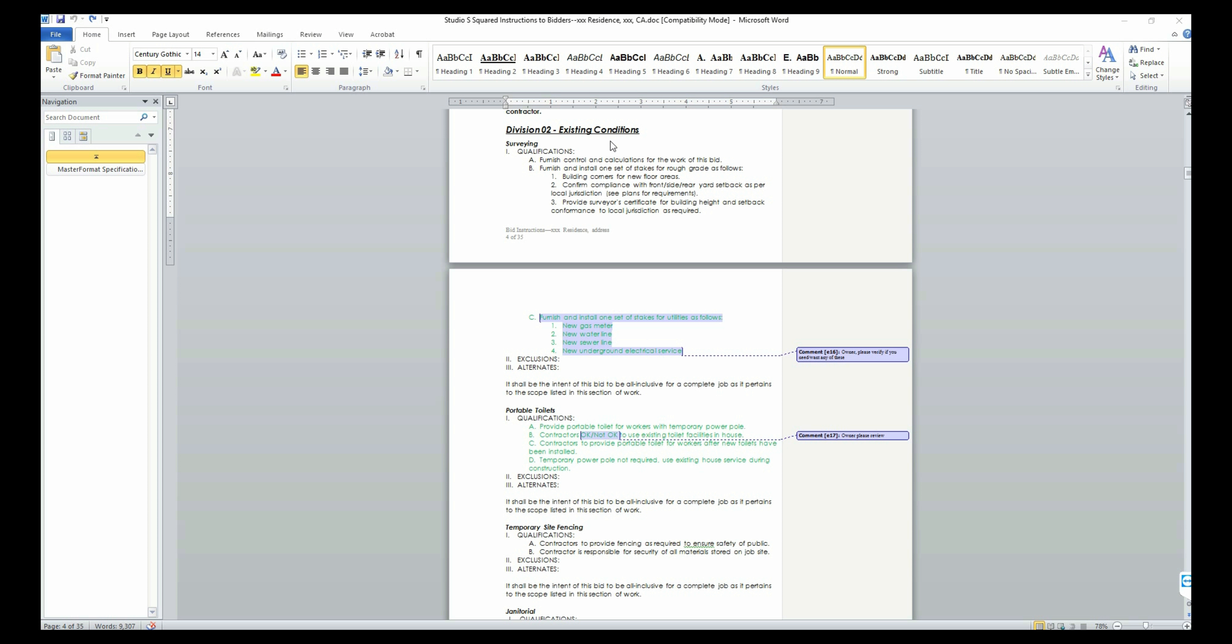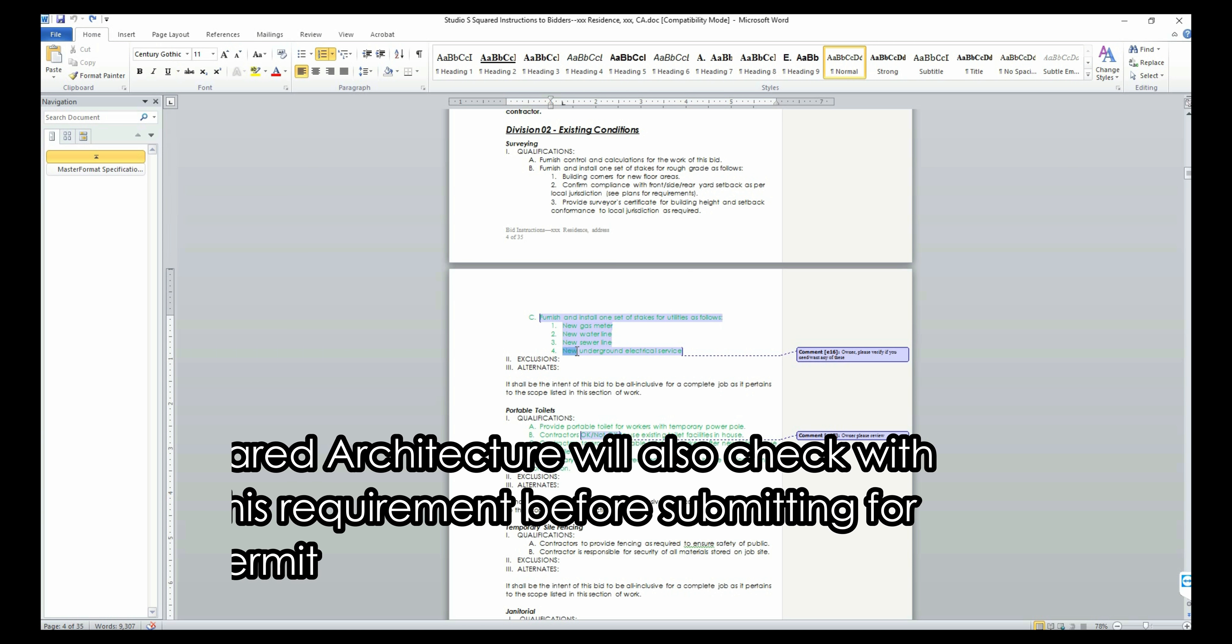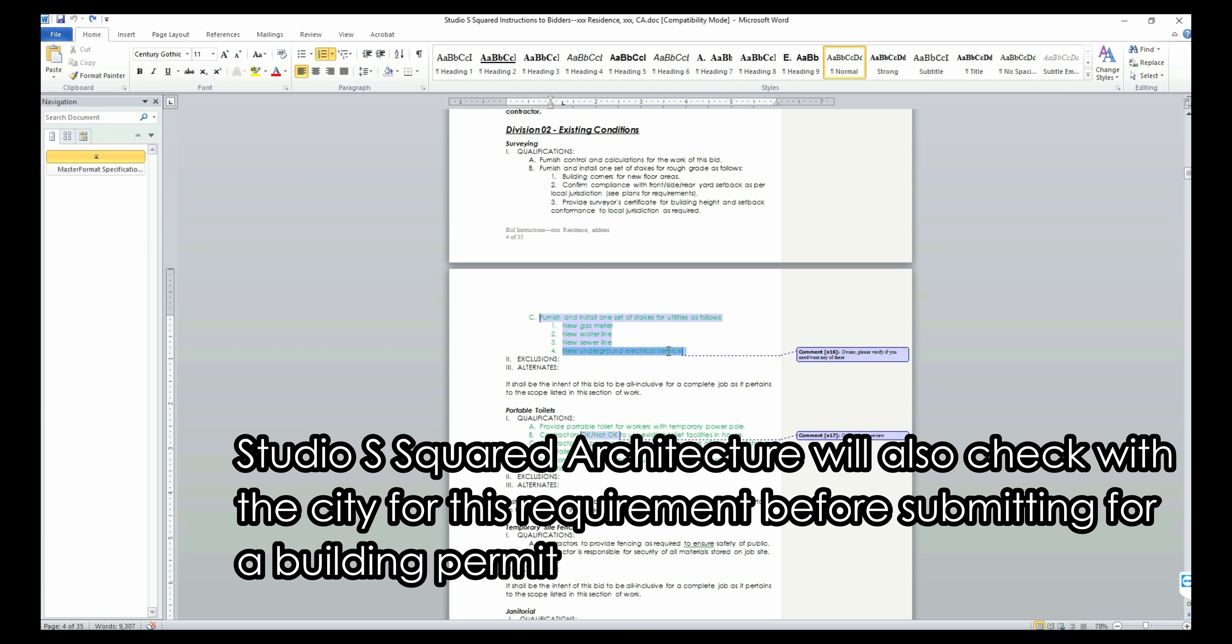Let's move on to Division 02. From this division onwards, you will have to look out for text marked in green. Green text just means that the specific item requires your input or edit. In the first section of this division, you can choose which of the marked utilities needs to be new versus existing. For a new construction, you will definitely need all new utilities. Undergrounding your overhead electrical service is optional in most cities, but in some cities it's mandatory. Please check with your jurisdiction for this requirement.